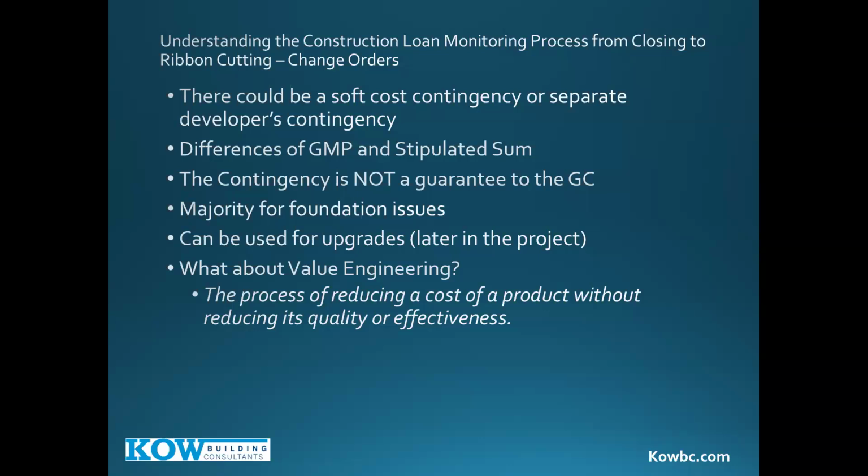About 5 years ago, there was a gasoline spike, and we saw a lot of subs put pricing with an asterisk that said, if the national gasoline price is above X, we reserve the right to upcharge this amount. So they built in a little insurance layer for themselves. You may start to see that again. It's something we're going to keep an eye on. It may be coming. Haven't seen it yet, but if history serves, when gasoline goes up considerably fast, that happens.